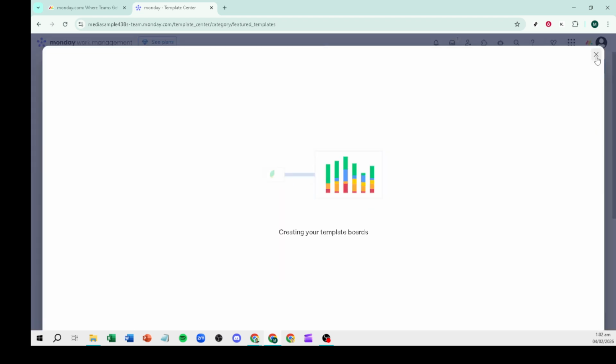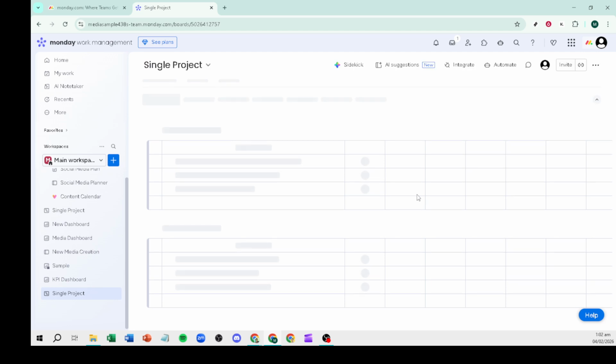Within each phase group, break down your deliverables into individual items. Think of each item as a key task or outcome that must be completed within that phase. For more granular steps under a task, use sub-items. Sub-items are great for checklists, handoffs, or multi-step tasks where you want to track smaller actions without cluttering the main board.